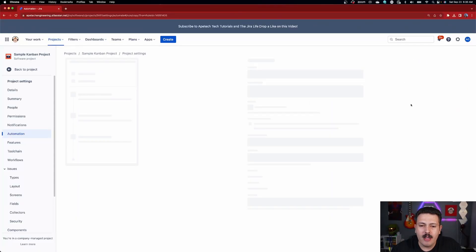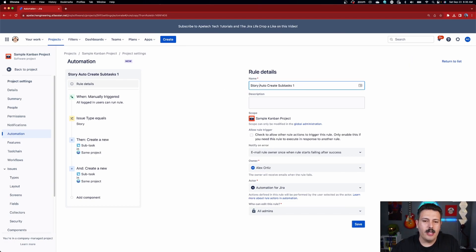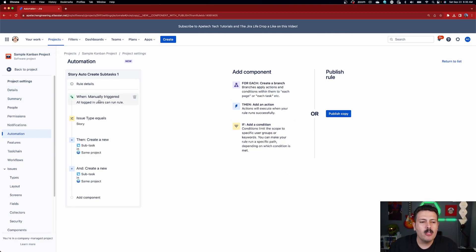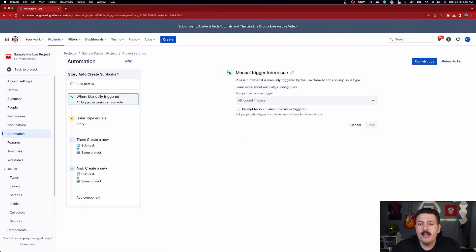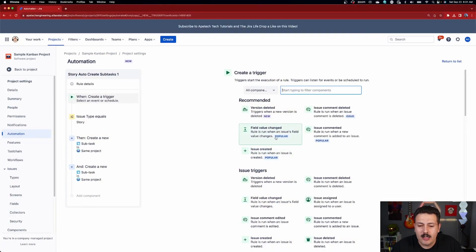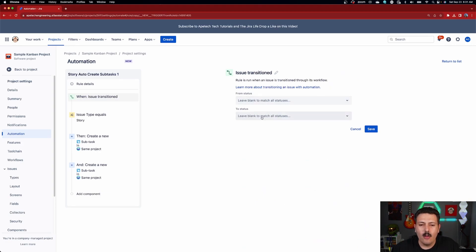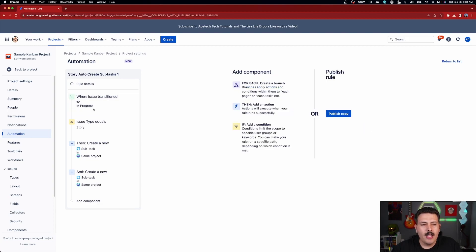Instead of going to my 'auto create subtask one,' I'm going to make a copy of it — I want to keep that old one — and call it something like 'story auto create subtask one.' Before publishing, we want to change the trigger. We don't want this to run because I clicked the button; I want this to happen automatically. You have a couple of different options: when an issue transitions into a specific status, when you create a story, or when a specific field is updated — like when you add the fixed version or pull it into the sprint. I'm going to show a random example: we'll listen for a transition, grab 'issue is transitioned,' and set it to whenever it enters 'In Progress.' Click save, make sure the condition still limits it to stories, and then create the subtask.